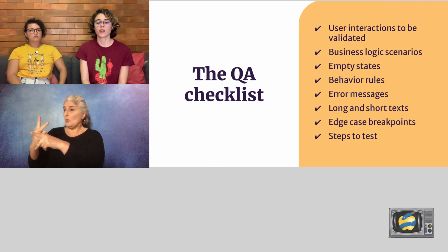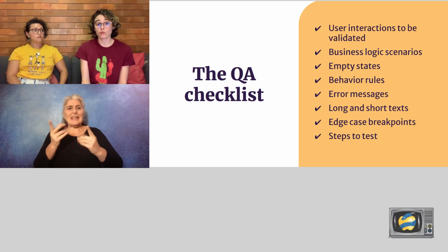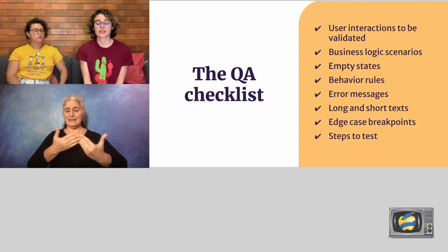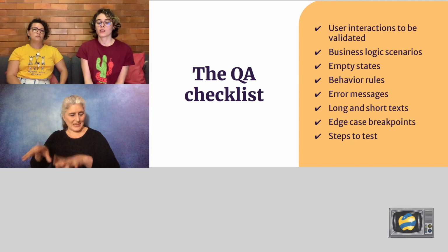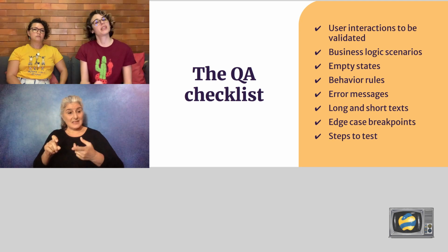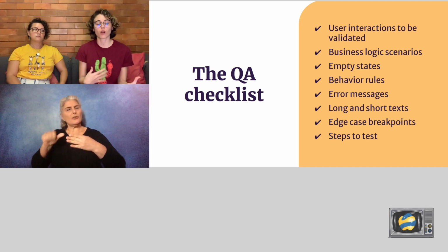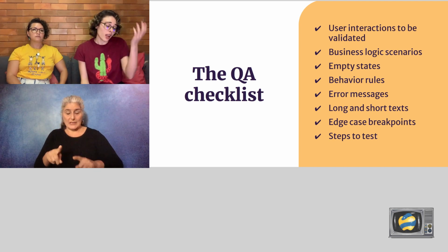They knew right away what they had to do to QA the test, and they finally understood that if you want something else from the test purpose, you should create a new test, not just go back and forth with the same one. And as you see, it's just a checklist.